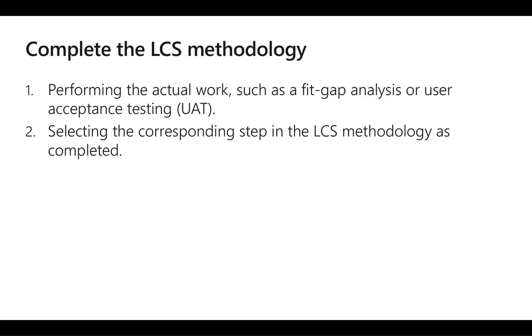Completing the lifecycle service methodology is a major milestone in each implementation project, and it is cut over to the production environment. To help ensure that the production environment is used for live operations, Microsoft will provision the production instance only when the implementation is approaching the operating phase after the required activities in the lifecycle service methodology are complete.